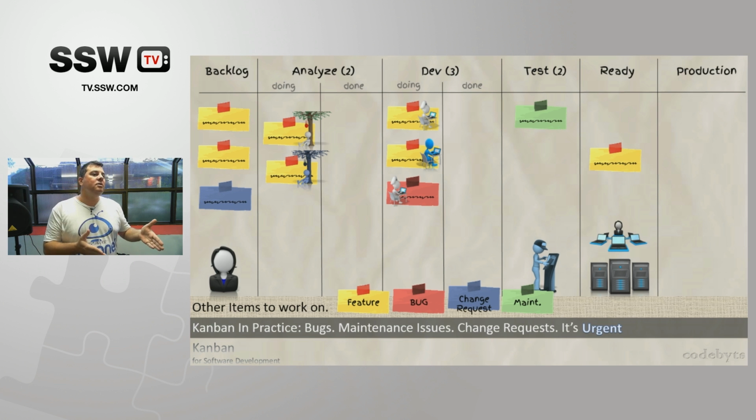You have to have a definition of done that the whole team and the product owner agree on. You need to know when you're done. In our company, we work on features, minimum marketable features. So instead of user stories, for us they're MMFs, and they have multiple user stories. I think in Scrum you call them tasks, or in TFS. I think in some agile circles they call them epics. Everybody calls them differently, but basically we have a group of things that we work on, and that is the minimum marketable feature, which means that it adds some value to the product. It's not just a user story, but some kind of feature that adds value to the product. And until that's done, we don't consider it done.